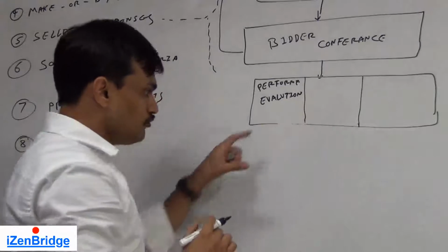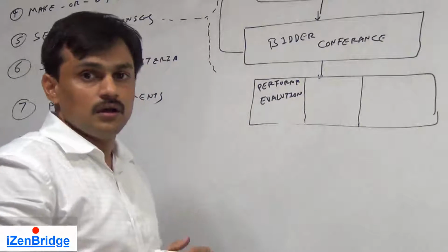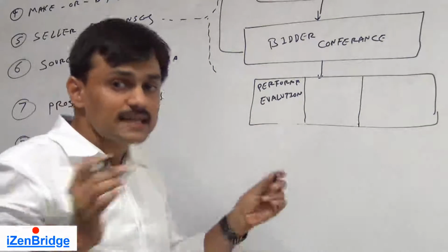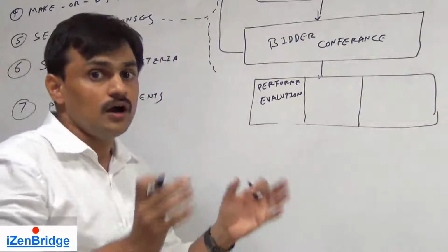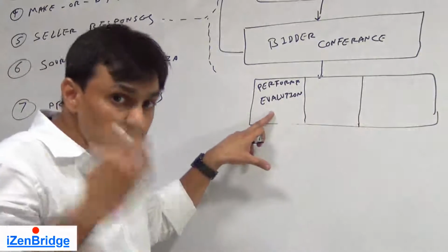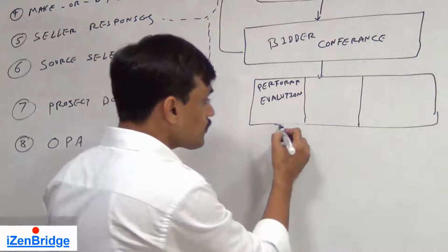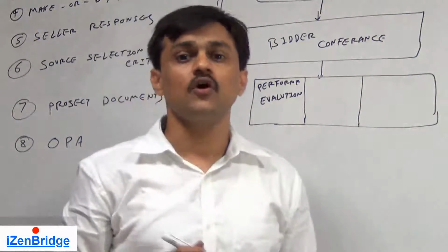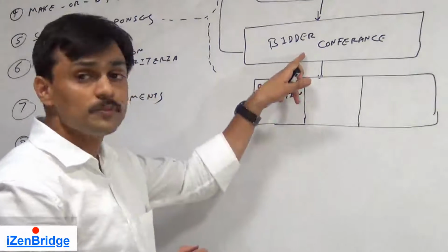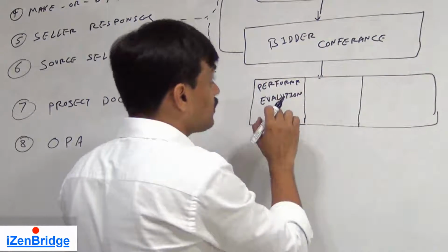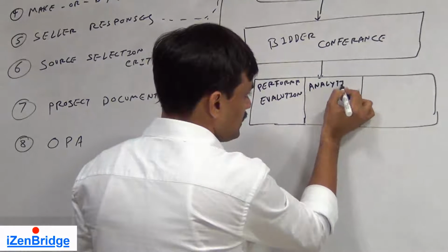In general, weighted source selection criteria like total cost of ownership, technical excellence, proposal quality, warranty, etc. will be used to identify which proposal is best out of those collected. We may apply another technique called analytical techniques. Few things may not be very clear from the proposal, so we may need to evaluate the vendor as well as the proposal by applying analytical techniques.